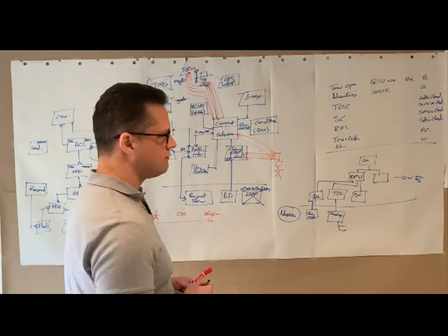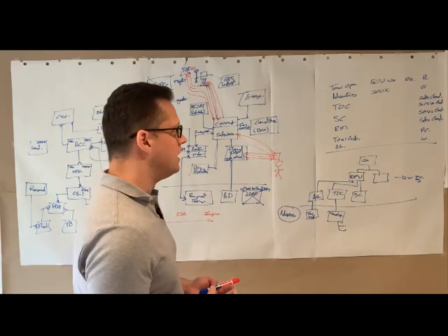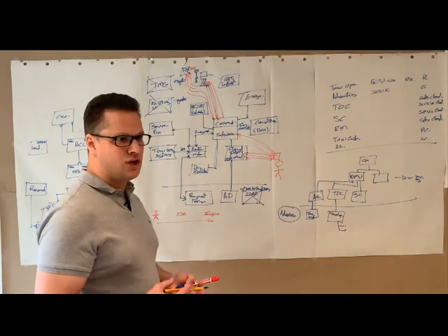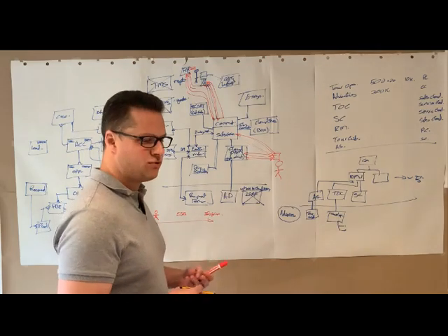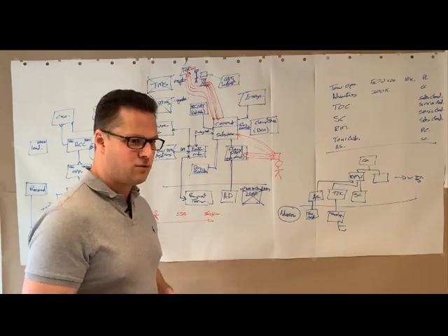So those that have less debt, possibly those with a lower number of tour operators in the region, ones that don't already have an existing Salesforce Sales Cloud, perhaps they're already just using spreadsheets. That could be a good place where we could start.